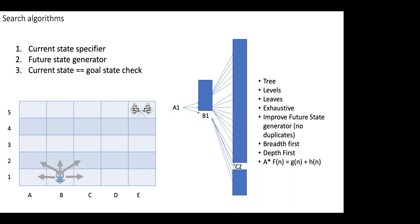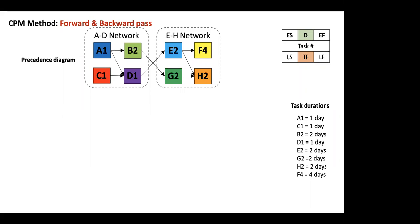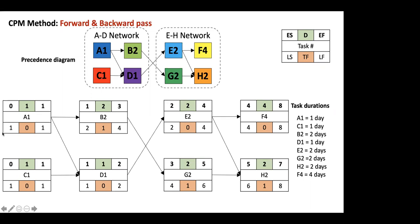To summarize: this is the simplest, stupidest example we could find that shows the theoretical problem. You have two networks, A-D-E-H, four tasks each: A, B, C, D, E, F, G, H taking one, two, one, one, two, four, two, two days. This is your network diagram. We solve this using CPM — early start, early finish, late start, late finish, float, duration, total float, forward pass, backward pass. The solution gives an earliest completion time of eight days — the duration of the project is eight days.